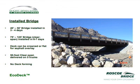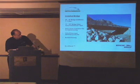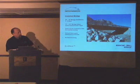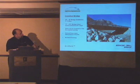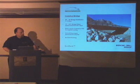And generally speaking, this shows a 65-foot panelized deck bridge in Wyoming. Again, weathering steel construction, very simple guardrail over here for Wyoming DOT. It didn't require a specific rating on this system since it was a low-speed bridge application and very low ADT. But a typical 40 to 50-foot bridge is, from start to finish, 3 to 4 days.